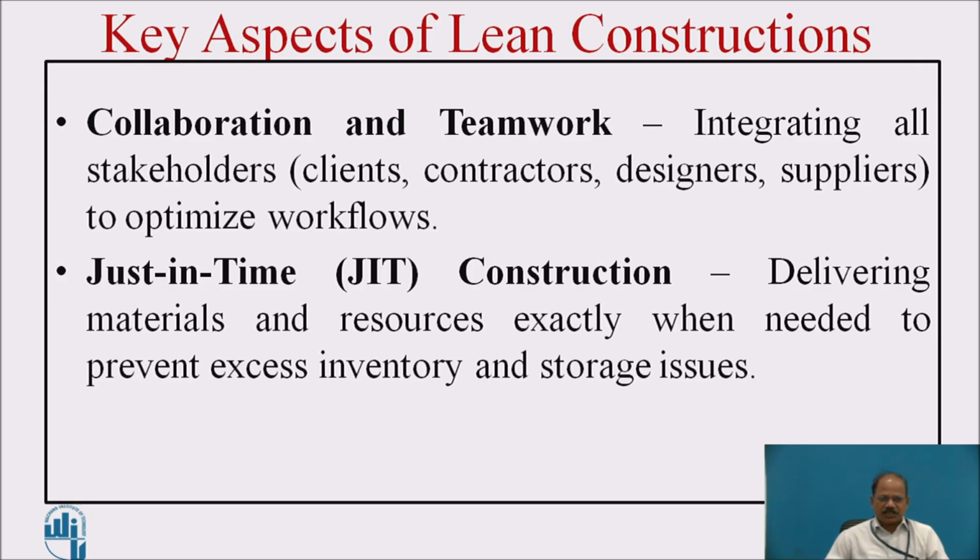Just in time construction definitely has been found to be cost saving as well as time saving. Delivering material and all the resources exactly when needed to prevent excess inventory and storage issues is one of the basics of just-in-time construction.